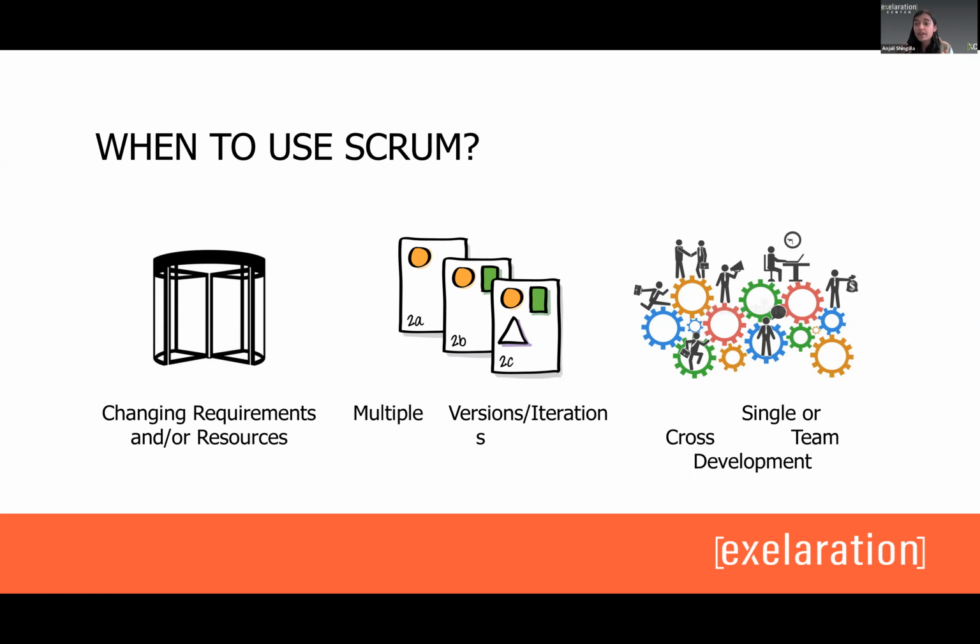And so that way you can have things like Scrum of Scrums, which is basically you can have multiple Scrum teams and then have a way for all those Scrum teams to come together. So this is great if you're working on a really big project and you have 3-4 development teams working on it. This also works great if you have folks in different countries.